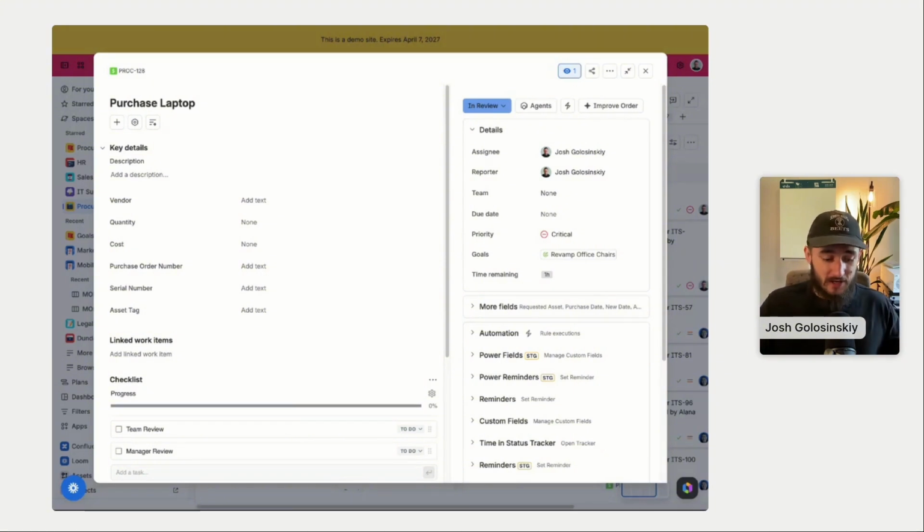And basically the checklist I run through in my own head is: is this a service management team? If yes, I go to the service management product, click blank. If no, is it a software team? And is it a software team that wants to run sprints or doesn't want to? If they do, I select Scrum. If they don't, I select Kanban. And if the answer is no to any of those, it's a business space. That's how I like to run through it in my head. There is that 1% of times where it might be something slightly different, or you might need product discovery, or maybe a project might work a little bit better. But 99% of the time, that's all the criteria that you need to actually worry about to create the correct spaces in Jira.